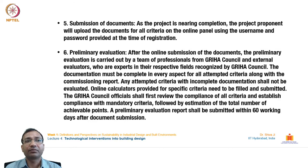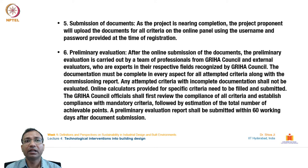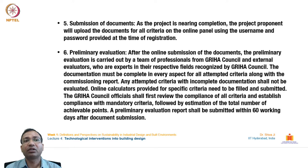As the project nears completion, the project proponent uploads documents for all criteria on the online panel using the credentials provided at registration. This is followed by preliminary evaluation, carried out by a team of professionals from GRIHA council and external evaluators who are experts in their respective fields.